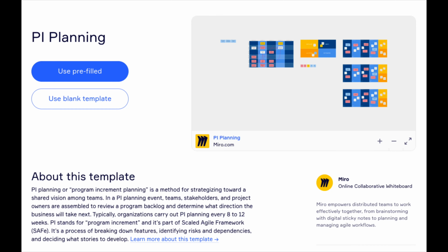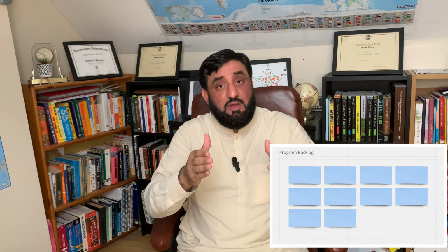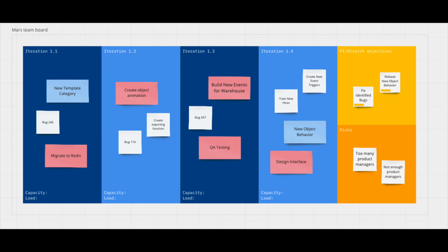So when you are sitting with your team and trying to create a roadmap, the best way of doing this is to use an application, a whiteboard like Miro. Then take a template from SAFe, then work with your team to take the highest priority epic, break it down into milestones, and plot those milestones on Miro to indicate which sprint they will be worked on. And by doing this, you will also discover where the dependencies are, because you're breaking down the epic.